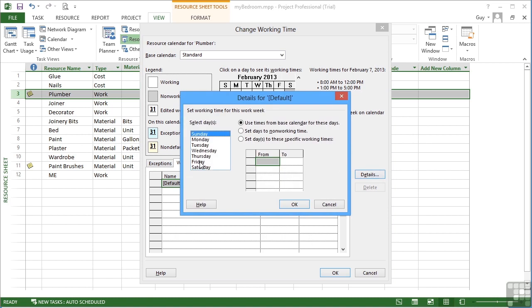It may just be that our plumber does not work Fridays. He's just not available on Fridays. He took a decision to only work four days a week. So we select Friday and set this day to be a non-working time day. You can see the hours disappear from here.